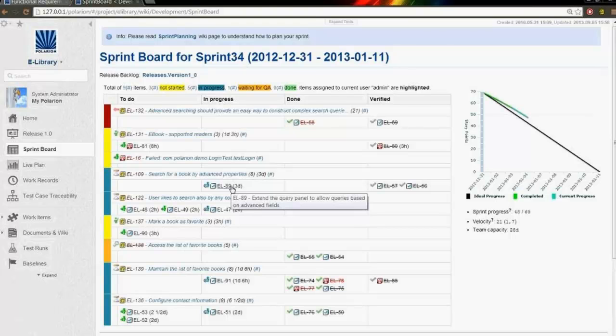There is always a workflow state for each work item. And if you change the workflow state, every user can work on their own work items. And if they say, okay, I'm in progress, this sprint board is automatically updated. So the Scrum Master at the end always knows the status of his sprint. He has an overview of his whole sprint backlog, and of course the product manager or the product owner has his own backlog where he can add his new requirements. In our example with the kitchen, we have our owner of the restaurant, our chef, and the kitchen help.